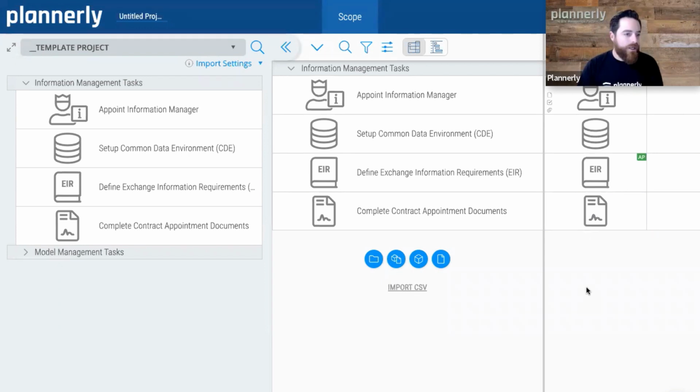In Plannerly, any project you have is a template. So you can either make it a point to create a template that you continuously update, or you can use a previous project with this information. And as Clive showed, you have the flexibility to choose what you would like to import, such as a milestone, specifically multiple milestones, the content that's inside of these tasks, descriptions, attachments, the teams who are assigned. So there's a lot of flexibility, and starting with the template provides consistency. So teams are very happy to save time and provide more consistency through their projects.